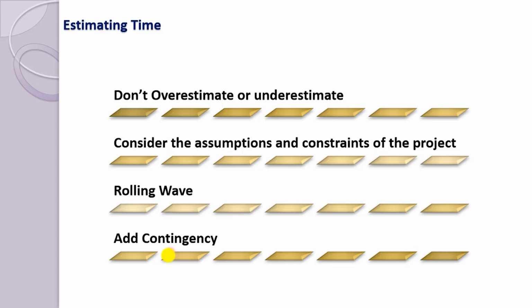So at that time, the project managers can use that time to mentor the team on the new technology, ask them to work on the documents, study the existing application, and gain the functional knowledge. So, if task A is estimated to start on day 10 and to last for 3 days, but task B cannot start until day 16, in effect, you can take 6 days to complete task A before it will start to affect the project.